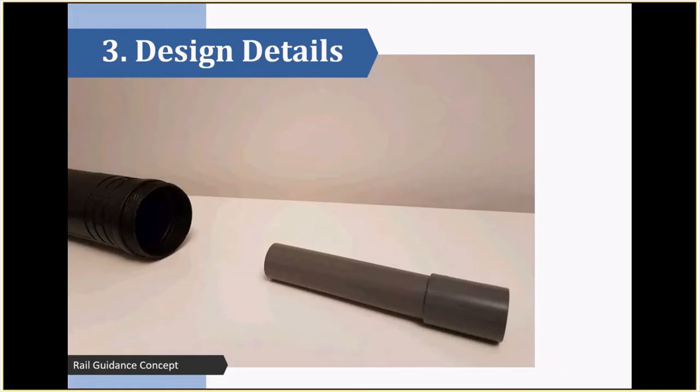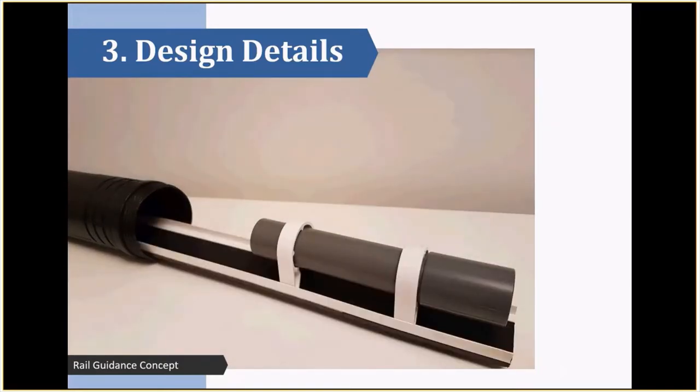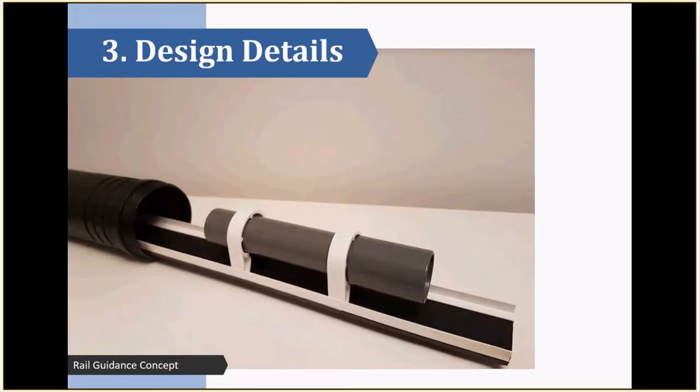So my proposal was to install the new spigot and socket sections of pipe on integrated pipe supports and straps, which could then be placed on a rail system and pushed into the tunnel. So this photo shows the straps and supports, and in white the rails leading into the tunnel. So what this system enabled